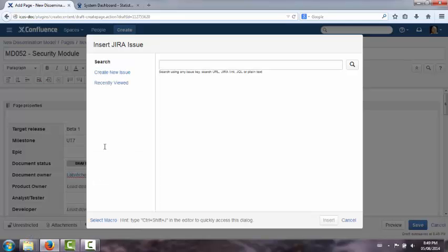The epic. So the epic, this is the really large feature that you get initially from your client where it's really ill-defined. This could be a few sentences or a little more. But essentially, this is a piece of work that is probably 60 days or more, and for which you need to do more analysis to really understand what your client wants in their software.